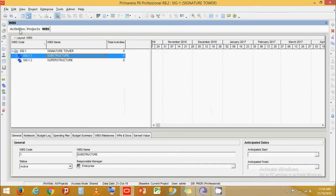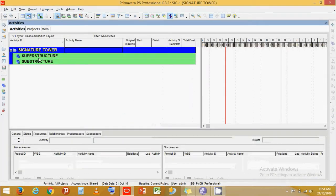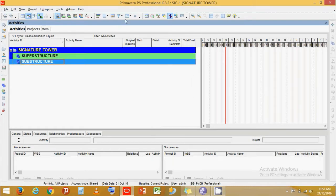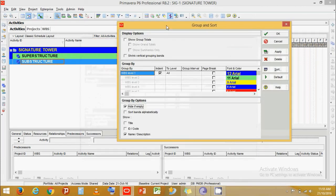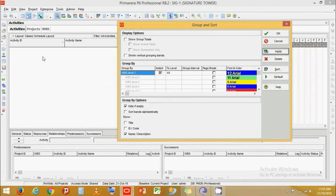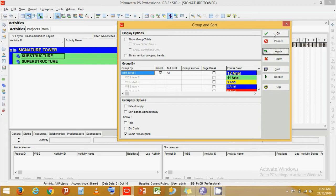You can go to the activities layout. Now we can see our WBS is created: Sub Structure and Super Structure. Click on Group and Sort. For those who cannot see this, that is because there is a tick enabled. The High Ref MD option indicates that if the WBS is empty without any activities, it won't show. Make sure you untick it, then press Apply, and click OK.